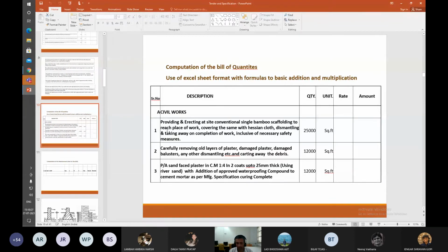So providing and laying of 150 mm, 1:4:8 ratio PCC, laid at a slope, with appropriate curing, etc.